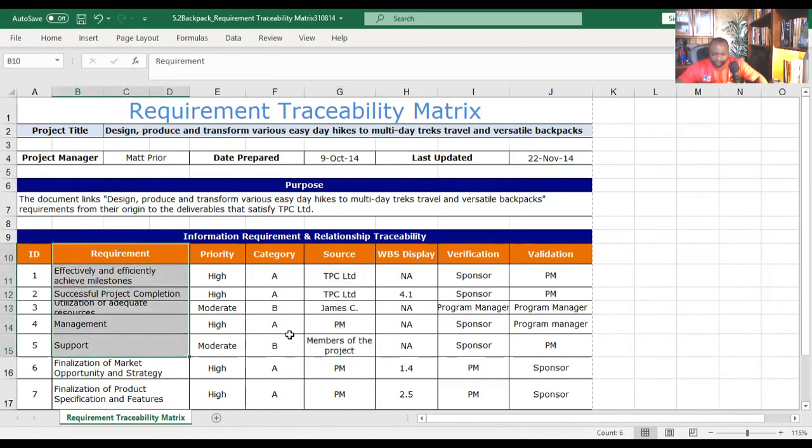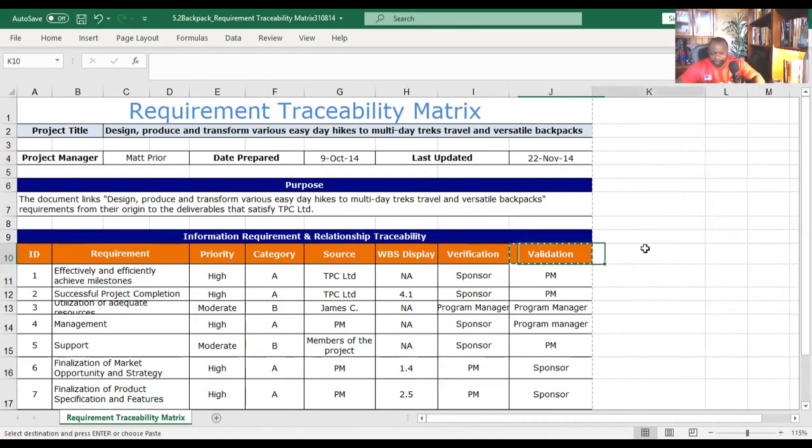Once you're tracking requirements to their origin, you can prioritize, you can categorize them for whatever they are: technical requirements, business requirements, functional requirements, whatever it is, solution requirements. And then if you wanted to, you can track them back to a WBS element. You could even track them back to a use case and a test script. So case in point, projects I've worked on in the past, we would have additional columns that map back to a use case, columns that map back to a test script, and all documented with numbers, so that people know what exactly they need to be tested.